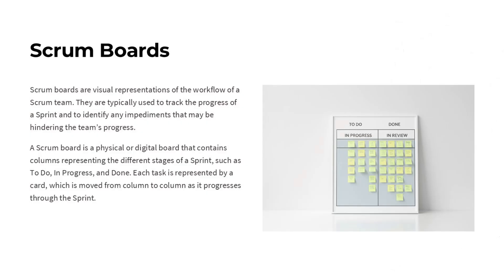Scrum boards are visual tools used by Agile teams to track the progress of a sprint. They typically have columns representing different stages of the workflow, like to-do, in progress, and done — each task or story is represented by a card that is moved across the board as it progresses. The board helps the team identify bottlenecks or impediments slowing down the work, providing a clear, real-time view of the team's progress and helping them stay aligned.